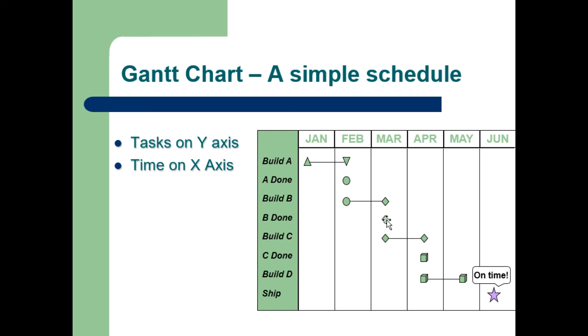Now you don't usually have to signal it's done. You could have this triangle from build A feed right down to the triangle of build B, right? We call this, so A is a predecessor of B. A has to be finished before you can do B.